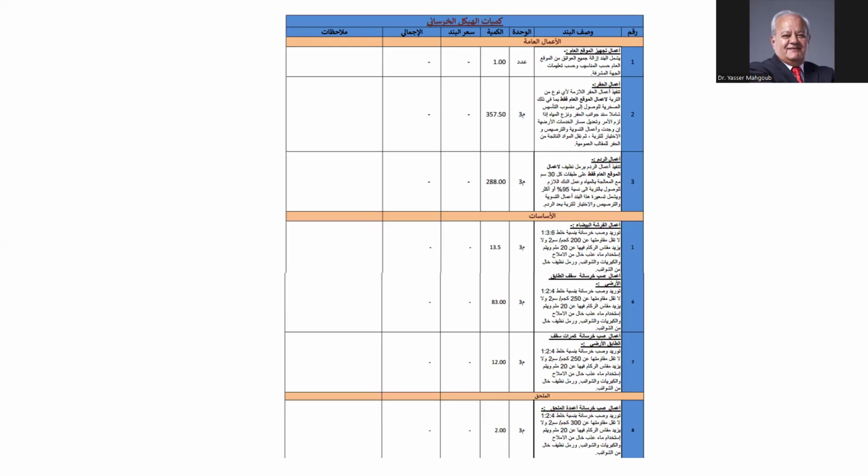There are 2 contractors that are equal or close, and then you start to negotiate with them. You cannot just negotiate the lump sum or the total. You can negotiate each item. Why did you put this very high price? They tell you because of material, okay, can we change this to this? Okay, so it will be reduced.